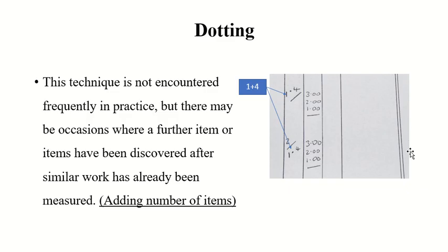If you are missing one item, you put the missing item before the dot, not after, and then the actual original number. So 1.4 means it was actually 4 and then somebody increased one more item. It doesn't mean the other way around. You cannot say it was 1 and then I added 4 items.